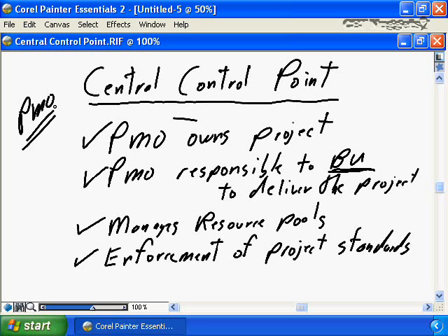It, again, is effectively as if the PMO becomes an external firm and contracts out to the business unit for delivering of the projects. Sometimes this will result in an adversarial, us versus them relationship, where the other implementations of the PMO, where we have the coordination, the resource pool, the development of the best practices, lead to a more sharing, more common focus within the organization.